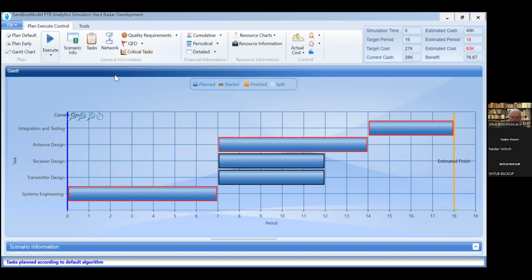And typically, the project team will try to add resources in order to reduce the duration of some critical activities. However, in reality, most project activities can be performed in more than one way, either by different combination of resources or by using different technology, or maybe using a subcontractor, etc. So the first thing we want to do is to add the 3-point estimate and to add some more possible ways to perform each activity.